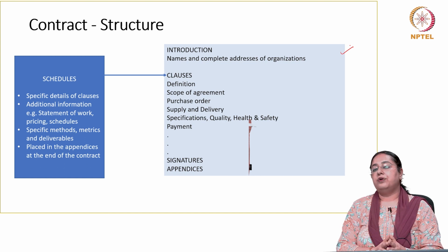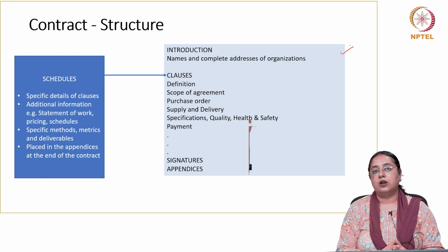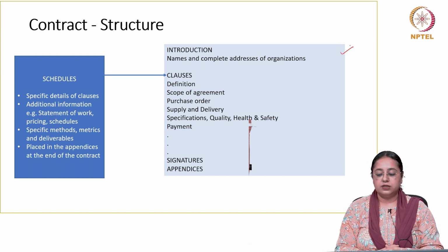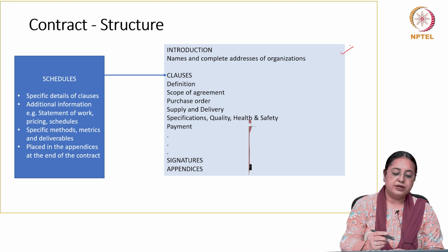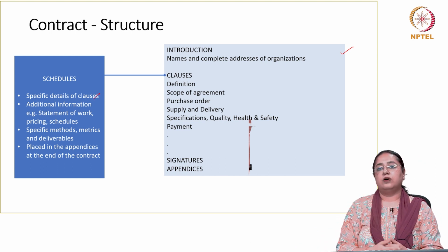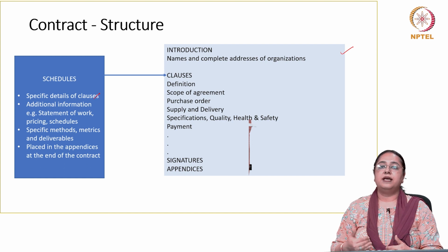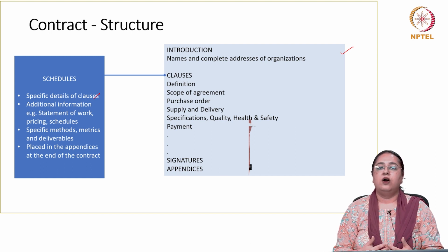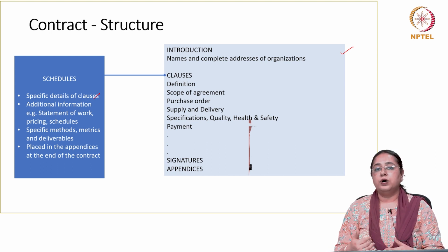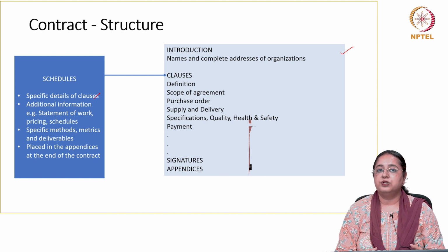But before writing the clauses, it is very important to know the schedules. What are the schedules? These are the specific details of clauses, right? When we write clauses, we don't have the space to give details of certain aspects, like the statement of work, and if we want to mention the pricing, what pricing formula we or the supplier are going to use.